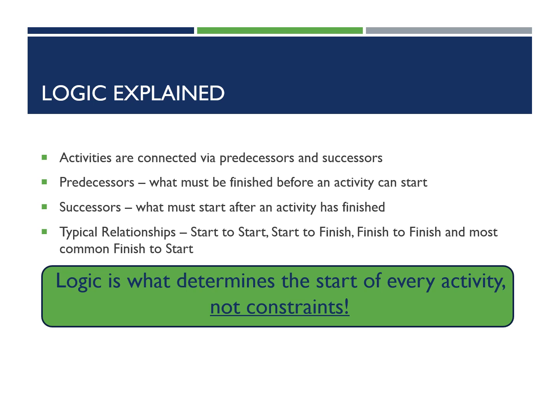We don't use constraints. Constraints aren't typically allowed. And we're going to go through that in the specification discussion. But we typically don't like to see a schedule that's been driven by forced dates. So we don't want to specifically say on May 1st, we're going to start forming, and then on May 3rd, we're going to do reinforcement, and on May 5th, we're going to pour.